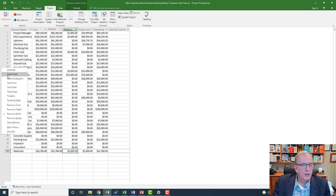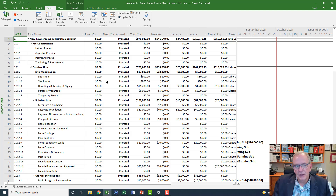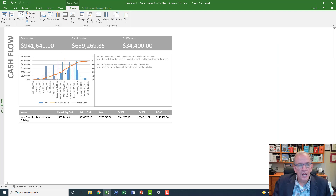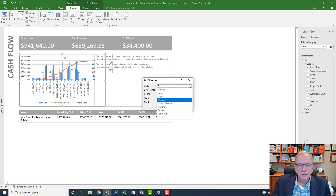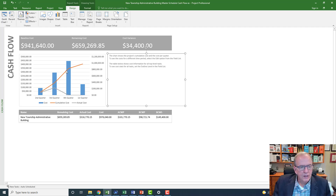I'm going to slide to the left again, go back to my Gantt chart. Now that we've created all this data we can review it. If I just wanted a simple cash flow report, I could go to Report, click on Report, go to where it says Costs, go to Cash Flow, and that would give it to me. When you first open it, it usually opens up in quarters for some reason — you'd see something like this.